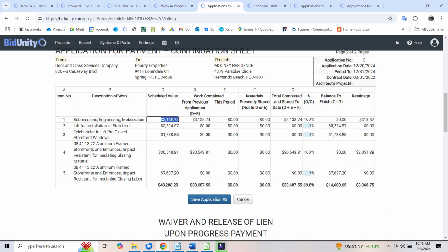And I explained to the arbitrator, line 1 is generic text that just pre-populates, and by engineering we mean the analysis that goes into determining the correct configuration of windows and components. We don't necessarily mean that we're allocating funds to be spent on a professional structural engineer.